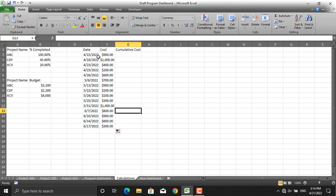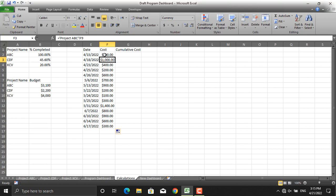We take only the start date of our activities as the horizontal axis, not the end date. This relates to the concept of cost accruals in project management. There are different types of accruals: you might pay the cost at the start of an activity, at the end of an activity, or distributed throughout the activity. These are different accrual types in project management. For cumulative cost, the logic is: the cumulative cost at any row equals the cost at that row plus the sum of all costs before it.